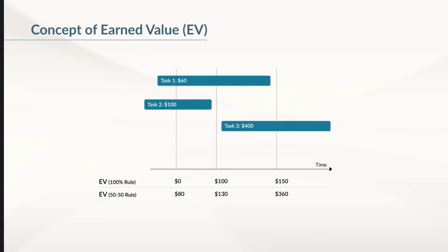One of the ways you can measure accomplishments is to compute the earned value, EV for short. It is important to understand that EV does not relate to the time spent on the project or the expenses so far. EV is strictly associated with outcomes and accomplishments. It can be expressed either as a percentage of all necessary activities or as a dollar value of tasks completed.